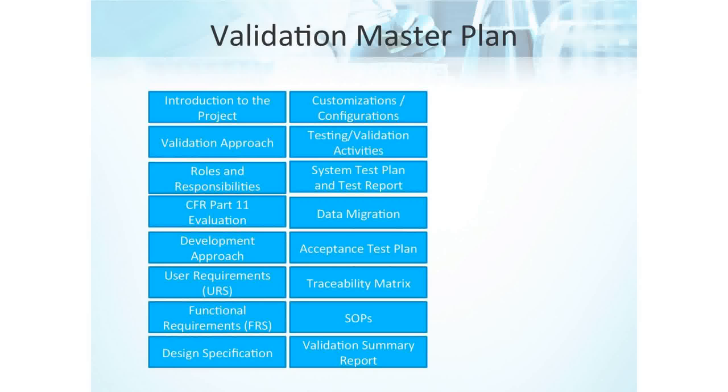And it's important here to have a qualified test lead who can strategize with you on the best possible way to design the validation and testing activities. So in the validation plan, it's pointing out that you have a test plan and also a test report. And actually that separate document, a test plan and test report, bookends all of your testing activities. That's right, because the test report is the report on how it went, on what you executed as a system test and how that went. And items in this section would include IQ for installation qualification and OQ for operational qualification.